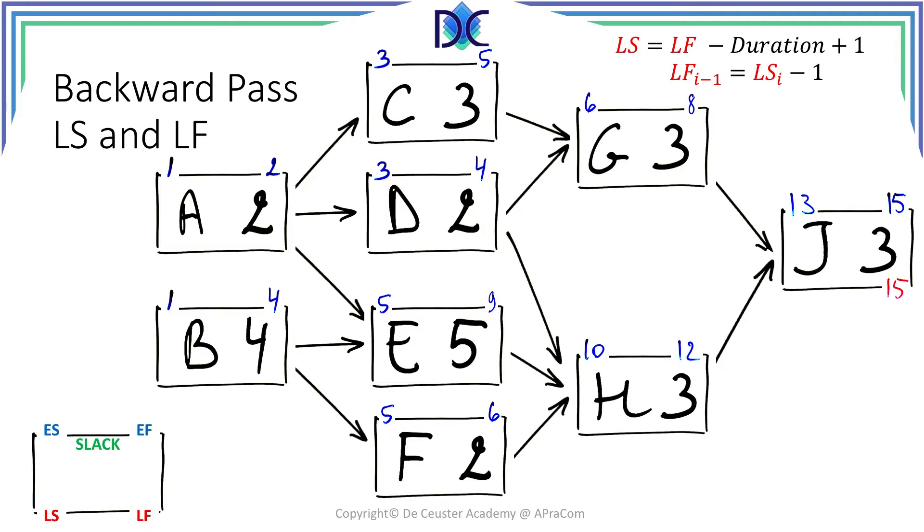When we calculate back from April the 15th we see that we cannot start with task J later than April the 13th. If we would start later than April the 13th the project will not finish on April the 15th. We can calculate this using the top formula.